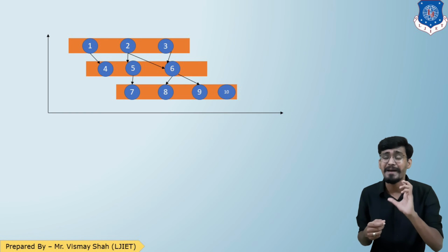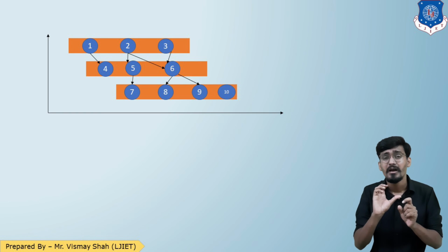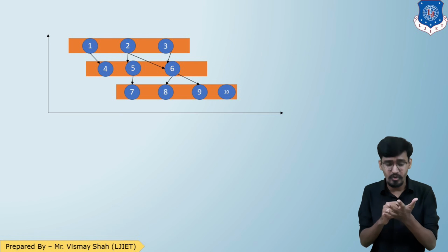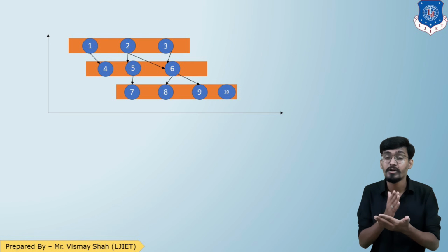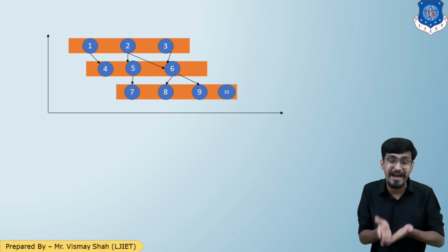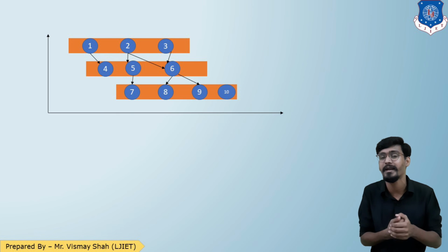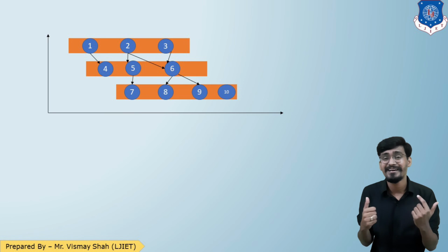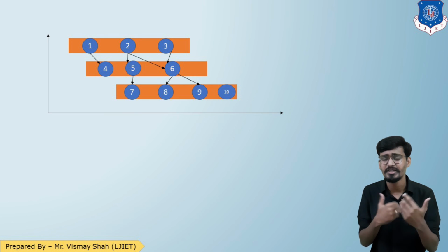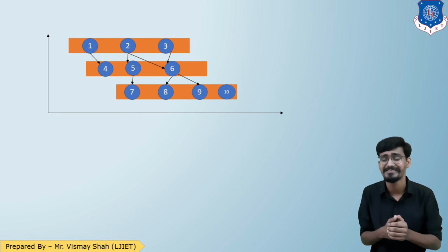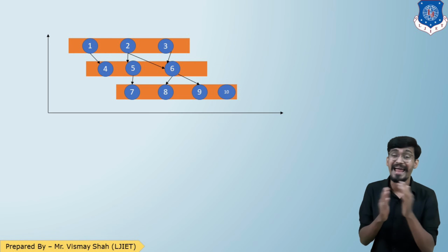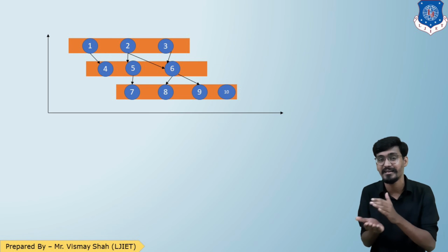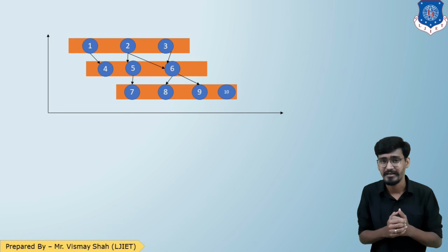And by providing these milestones, we can have better control of the project, for example, in activity A only up to milestone 2 is completed, and in activity B up to milestone 5 is completed. So we can have better control and better measurement of the project, and we can also define the relationship between two activities or two sub activities. These were the lackings of the Gantt bar chart and are the major advantages of the milestone chart. I hope we are clear up to this point.